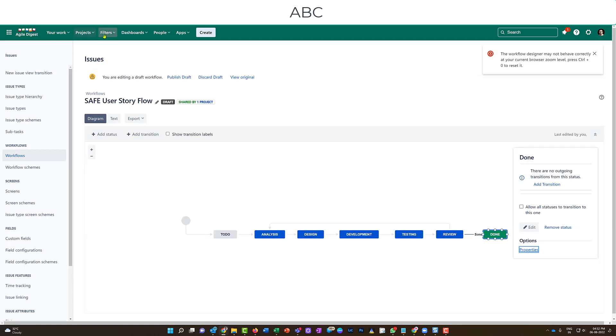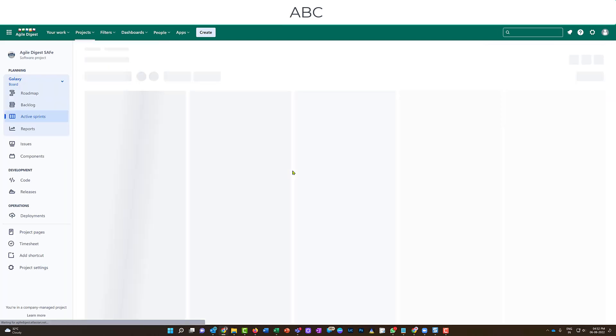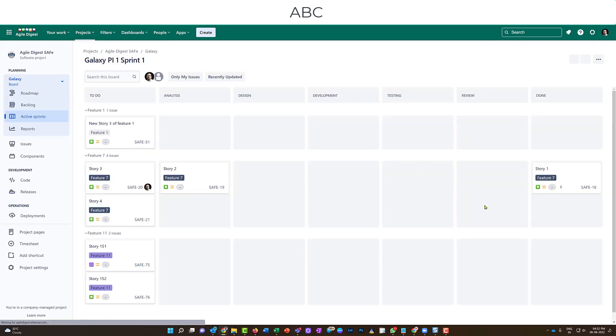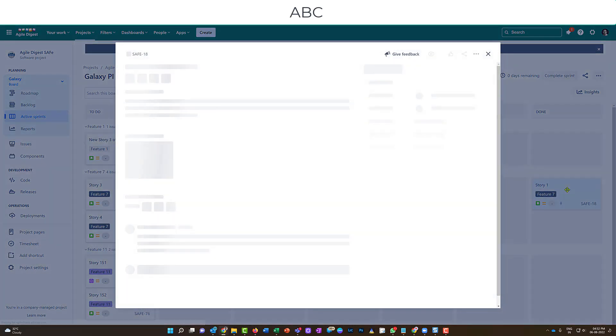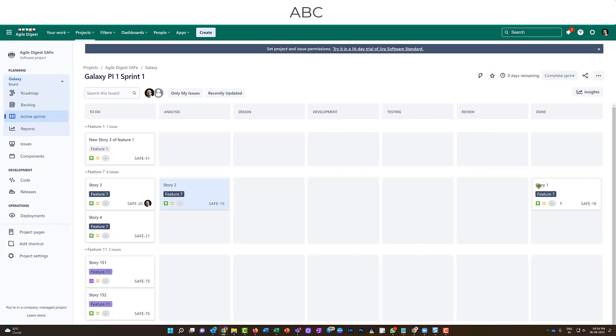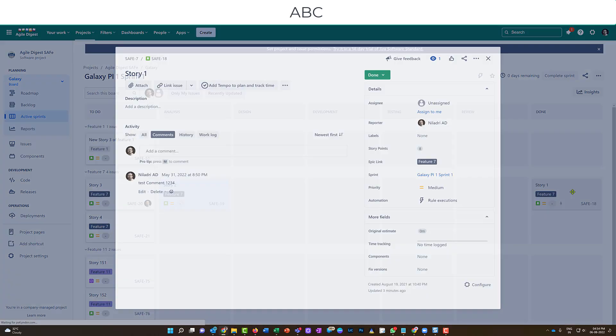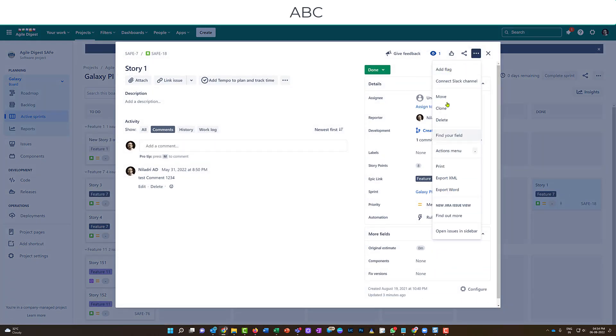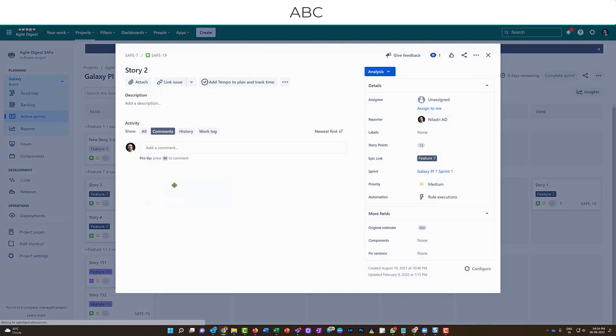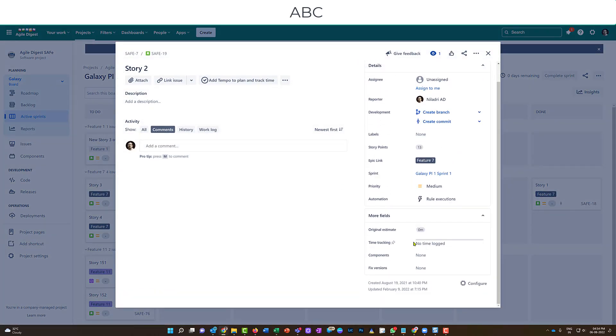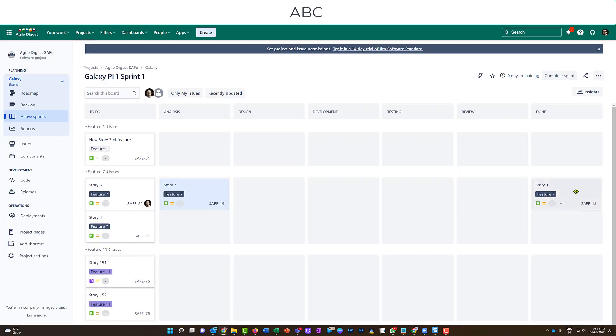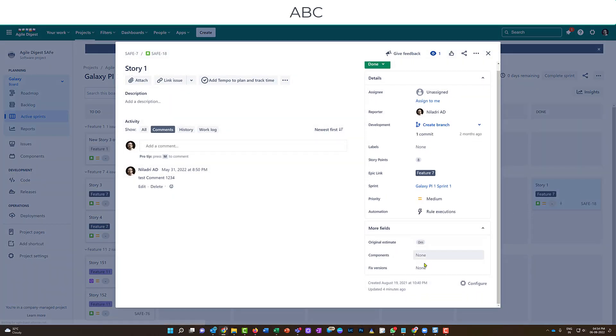So let's go back to my project and see how exactly that's appearing. Now if I come here and try to click on this, I want to log work from here. But if I want to click something from here, I will not be able to see that log work is appearing. So this log work appears only when it is not done. At the same time, this time tracking option is enabled. Now if I click on the story which is in done state, your time tracking option is not coming up.